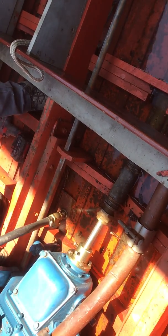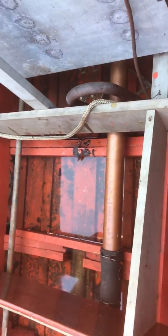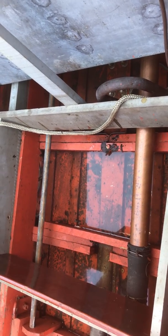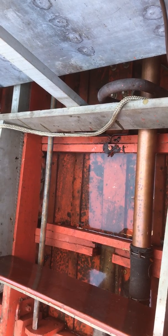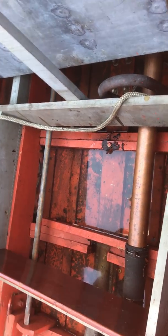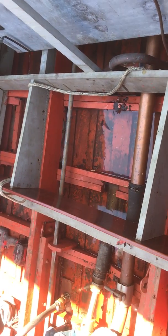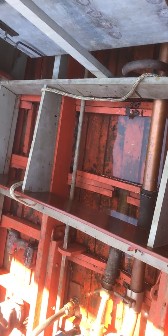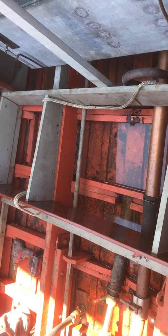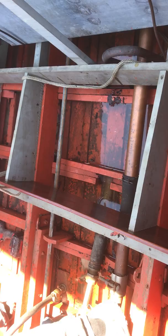On this repair back here, we've got two woodworkers — Matt and Jeff. Neither one of them likes their boats touched if they're in charge of a boat. But what I want to try to do is not affect the schedule with this. We'll take care of the repair, not push the schedule out past June 20th or any of that kind of bullcrap. If we've got to work some overtime, that's something Matt and I will discuss.